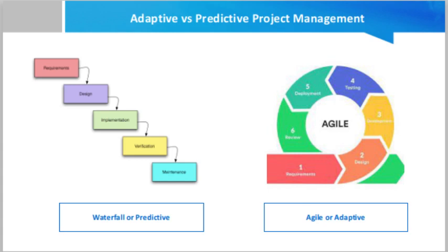It becomes quite challenging to change the direction of the project if something goes wrong. Predictive teams don't appreciate change, and often buffers are added to timelines to accommodate minor changes. The predictive planning strategy uses milestones to control the entire process. It is a very rigid model since tasks get activated when previous tasks are completed, and there is very little room with respect to dynamic resource allocation and scheduling.